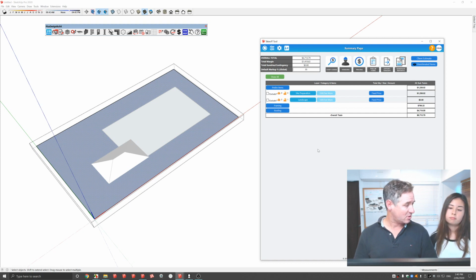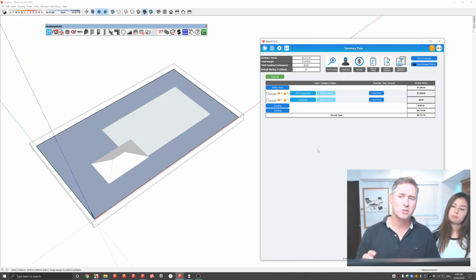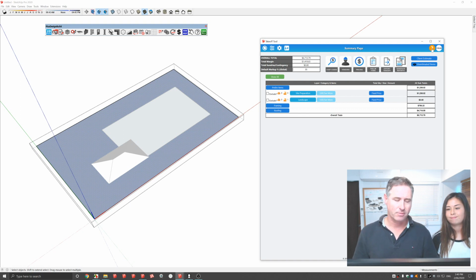So your preliminary items associated, really important. There's so much more to that, guys. Watch the tutorial inside of every single tool, because it'll take you to new tutorials and learn new things that you wouldn't have understood before. One other thing on preliminary items is it doesn't have to just be items that are associated with the job. It could be the time to prepare the job. It could be the time to prepare the quote. It could be a multitude of different items.